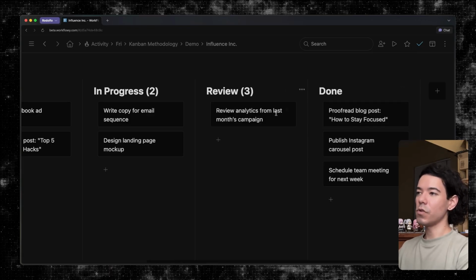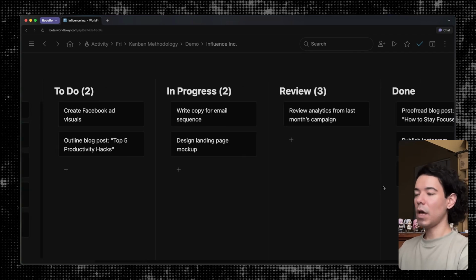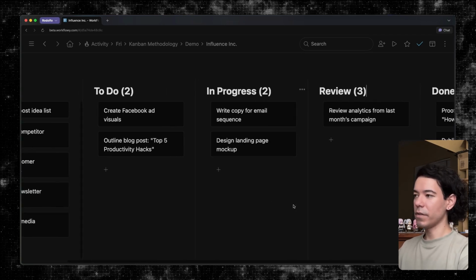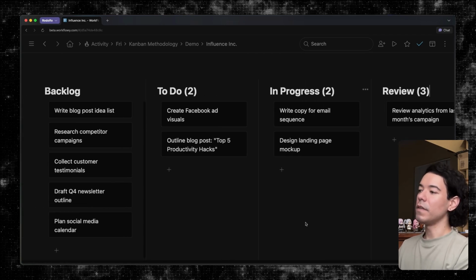And we can also see where certain areas or resources are perhaps being underutilized. Let's say that one person is responsible for the review or whatever this column stands for. And we see there's only one task here when there could be three. So that means that these tasks are not moving quite as fast as we would like, or maybe this person is better utilized somewhere else, all kinds of different things. And we can get an idea of that and all kinds of other things by just monitoring the flow of cards from one side of the board to the other.